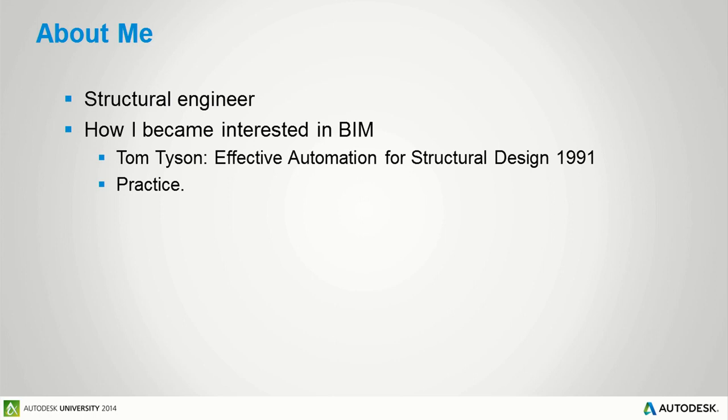So, obviously, I started to look at things. I put together an elevation view, put the sizes on there, put a plan together, put the sizes on the plan, went through the process. The contractor, after they win the bid, calls me up and says, so Ken, what size did you want? Did you want the W12 or the W18? Because I bought the W12. Great, so now I have to tell him it's the W18, and he has to buy a new one, and I have to get a change order, and the owner's like, do you know what you're doing? My boss is like, do you know what you're doing? It's embarrassing, and nobody likes that.